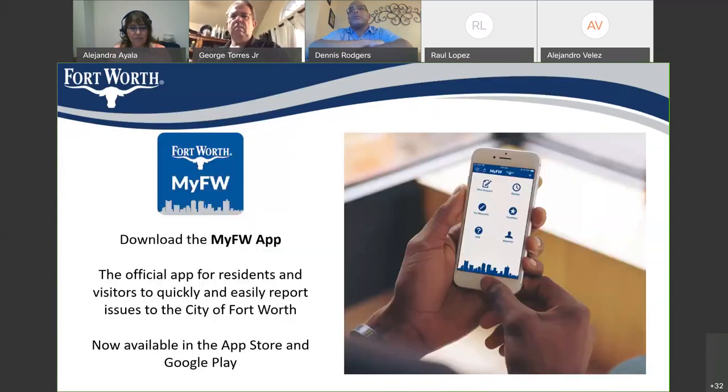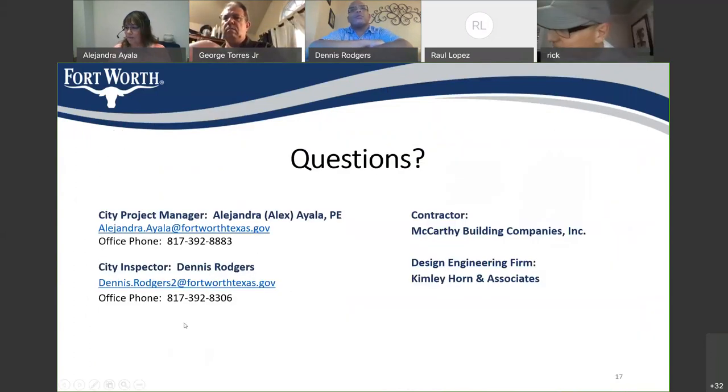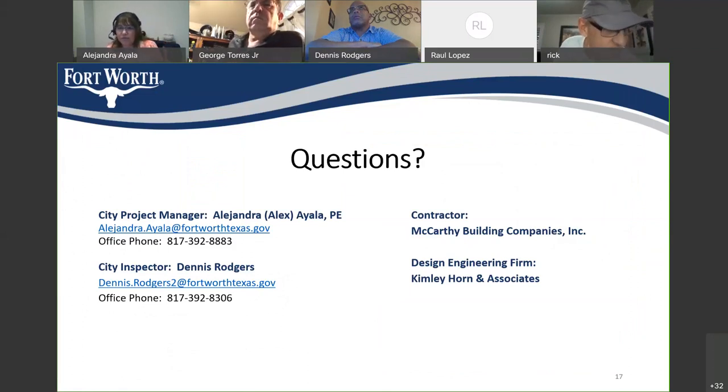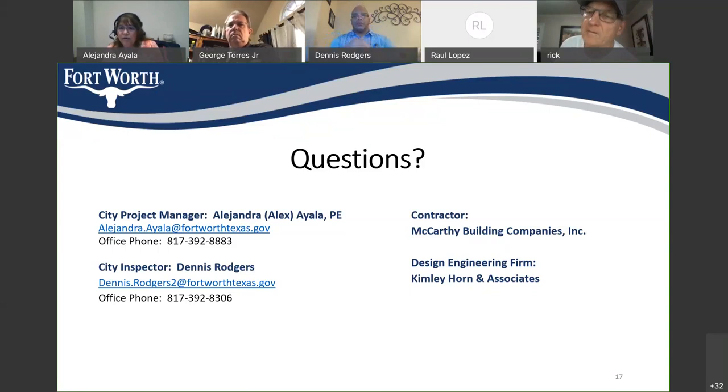Can you hear me? Yes, sir. Okay, this is Rick. I missed a little bit of the first of the meeting. Are you starting utilities, water, sewer, things like that first? We're going to start close to the south end of the project near 287 and Presidio, Sonoma Creek area. Right now, the franchise utilities are moving, but that area is going to come in with the storm drain first, and then progress from there. Okay. But I know that you're going to add sewer up along south of Bonds Ranch, I believe, where the warehouses are.